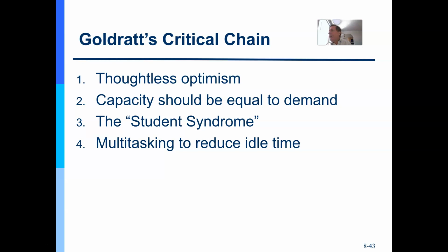And we had talked about Parkinson's law before, which was that you will make the work fill the time period allotted. So if I give you 2 weeks and you finished in a week, you're not going to report back that it's done. You're going to wait a week. You're going to review it again. You're going to make sure it's perfect, right? Move it on. It's a project. If it's done, it's done. We talked about student syndrome, right?